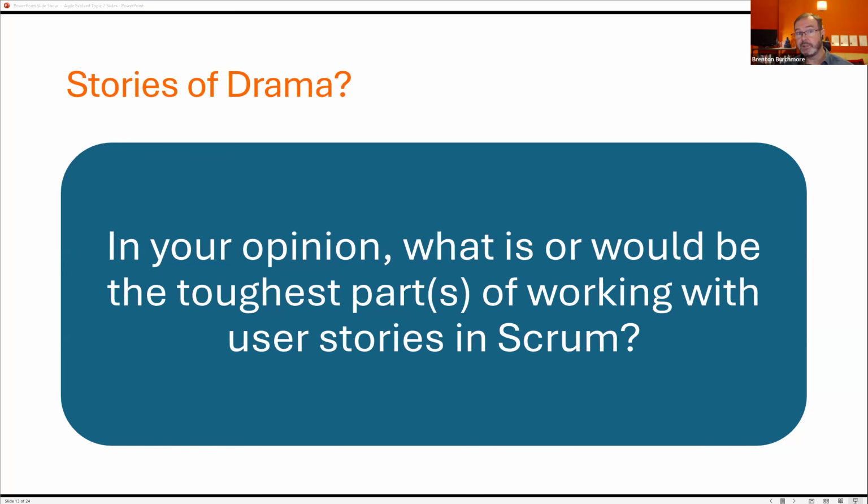Technical specifications lead to technical stories because someone in the dev team says, okay, they want this data appearing and maybe it's an API. We're going to pull that from their CRM system. So I'm going to have a technical story that says build the API in order to do that. And that might lead to something quite technical as a specification that's necessary for the API to work. But the actual story and the points needed for it to exist, that was decided by the dev team. And that's a technical story.